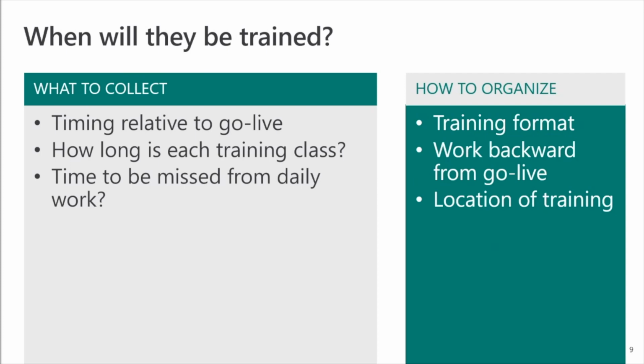likely sufficient. And so you'll also want to think about when you compare back to your who as well. Let's say you're implementing advanced warehouse management out in your warehouse. You likely can't train all of them at the same exact time. So you'll need to consider, I'm going to need to deliver this course maybe 2 or 3 times so I can just take out a few people from the warehouse at a time. But maybe, depending on your warehouse, you can take everyone out and shut the warehouse down for 4 hours while you do this training.